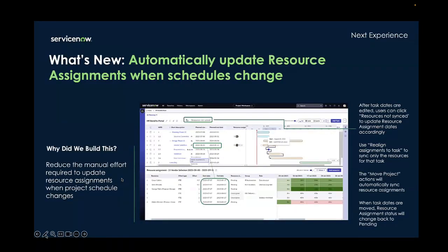Another new feature is that now when tasks are created, there's an easy way to sync up resource assignments. After tasks are moved, the icon at the top will say 'resources not synced.' Clicking on that icon will sync all the resource assignment dates to the project task dates. You can also sync them one at a time by clicking 'realign assignments,' or if you use the move project action to change project start dates, the resources will automatically be synced.